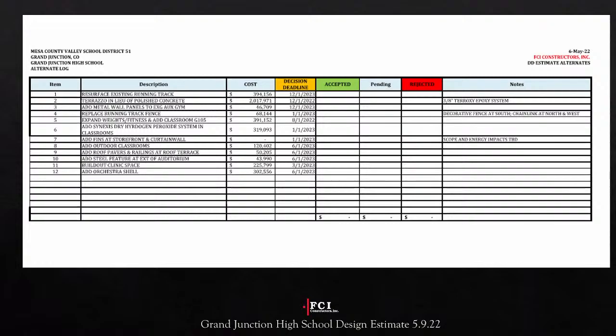So we've recommended using Falcon Plumbing, their team with Grand Mason Mechanical. They came to the interview with a labor loaded schedule, if you will. They used our big picture schedule, plugged in their activities, and loaded it with the labor required for each of those activities. So they know this work is coming, and that's the commitment they've given you. That's contract. They can't come back. Correct. And EC Electric has done the exact same thing. They understand that at the peak, they're going to have 30 electricians there.